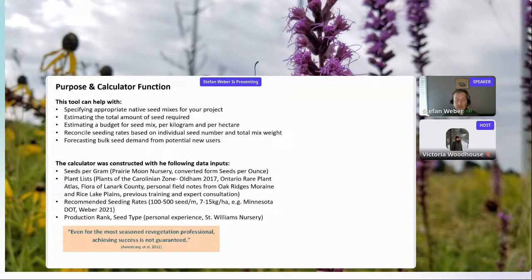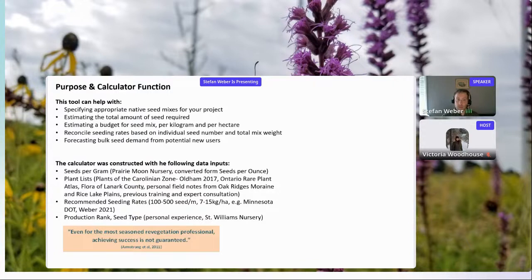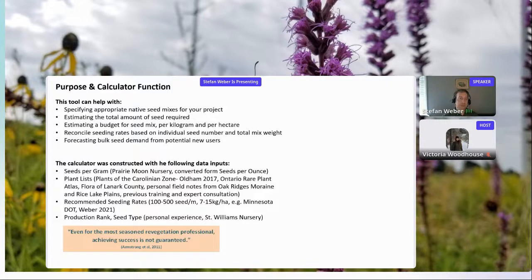We envision this as a tool for applied restoration practitioners prescribing seed to different project types and ordering seed early in the project life cycle. The calculator can help you specify appropriate native seed mixes for southern Ontario across different ecozones, estimate the total amount of seed required based on density of seeds per meter, and estimate a budget for your seed mix based on weight per kilogram and project size in hectares.